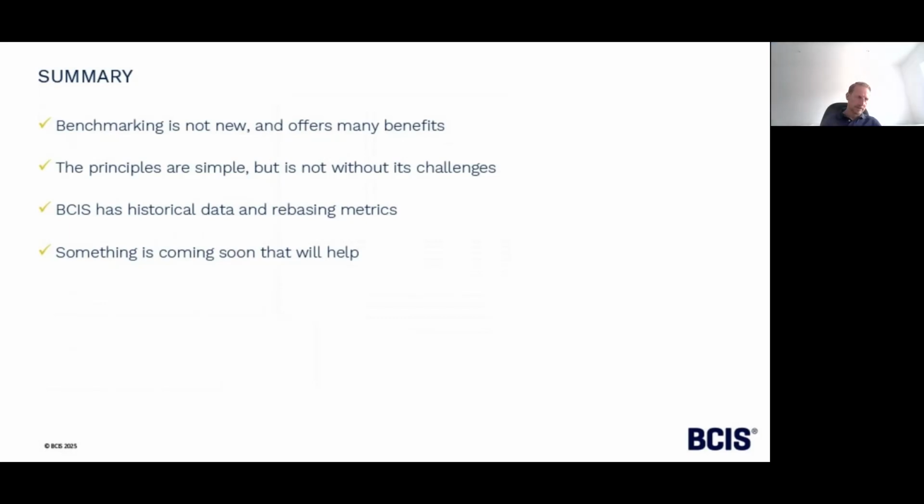And there are things out there, reference class forecasting is another good thing to use, where you're not just looking at your internal data, which we've talked about before, building that internal picture, but bringing in external data to compare as well.